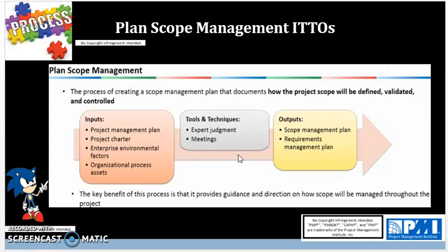That's really important because that needs to be signed off in the project management plan before we work on the project itself. This is just as important as a project charter because the charter is feeding in, but out of this comes a scope management plan because the plan for the scope has to tie to the charter. We don't want to violate the overall project charter at all. So the scope management plan has to tie to it very tightly.